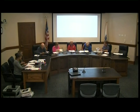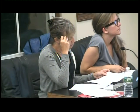Condition 48 is the one you're looking for. The applicant's request to remove storm-damaged trees resting in and around the existing pond requires further information. Trees requested to be removed shall be reviewed on-site with the Conservation Administrator and the findings reviewed with the Conservation Commission at a public meeting prior to removal. Any removal shall occur under frozen ground conditions. I think that was your direction. The decision is all the same anyways.